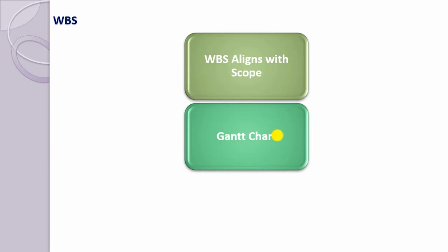For example, take the redesigning of the framework example, where I have to design the entire framework in the new technology for an application. Whatever estimates and WBS I have created initially, it has to be taken step by step. I'll take a simple transaction and master screen. For example, for the financial module, I can take one master screen, implement it in the new framework, and give the estimates and the WBS to the client. Then I start expanding once I have confidence in the team that yes, they can achieve it, because one prototype, one functional module is already ready. So this is how you should go about it.